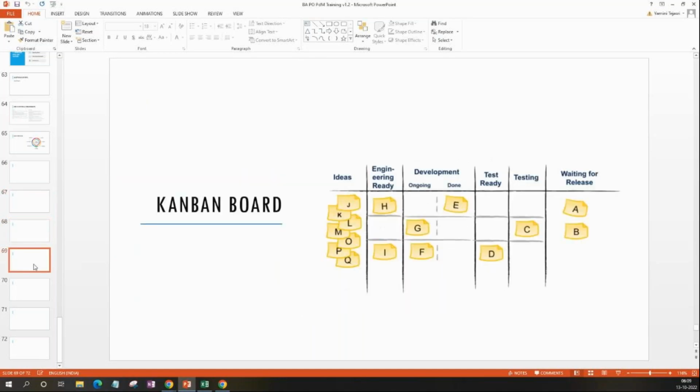So all the development, testing, all the phases, will be updated by the team when it's done, right? And we can see how it progresses. So once we release everything in the sprint, and this whole set of things like developing, testing, then release, it will be updated when it's done by that specific team, right? They will update it, and then we can see across the board what has been done. Yes. In Kanban, we can see live. Every day we'll have the daily stand-up meeting, right? In that we'll be going through the Kanban board, so we can see as and when the progress happens.